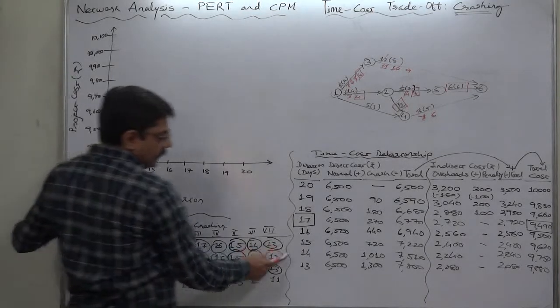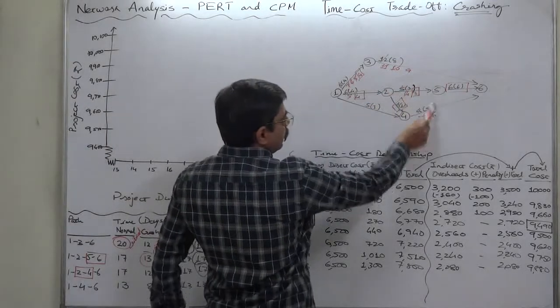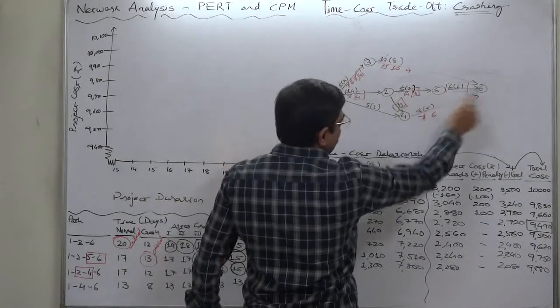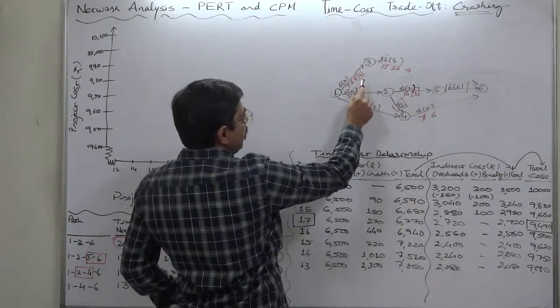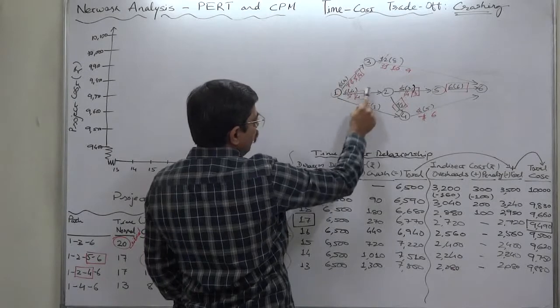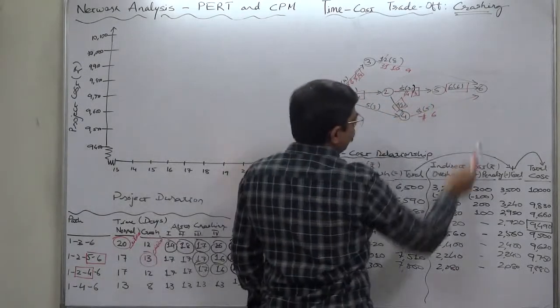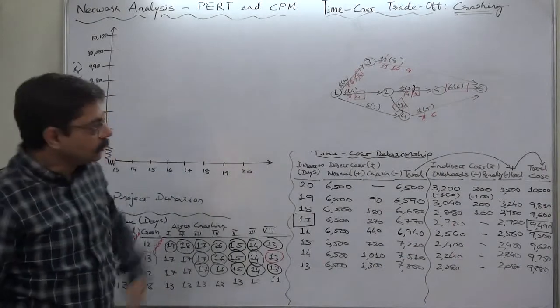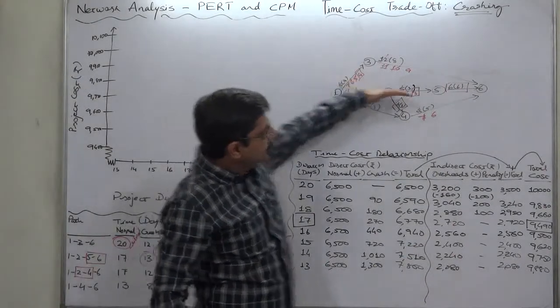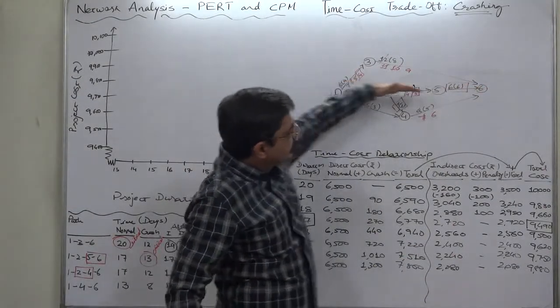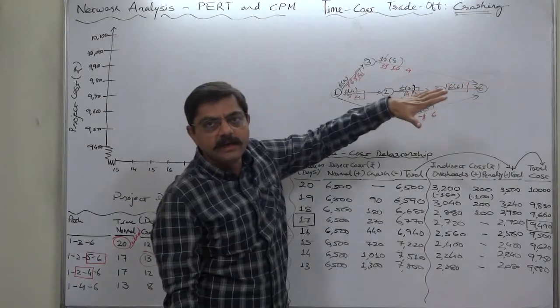These two can be further reduced by one day but this path cannot be reduced because we have reached the crash time of activity 1,2 as well as 2,5 and 5,6 all the three. So this path cannot be crashed further or rather any activity on this path cannot be crashed further.